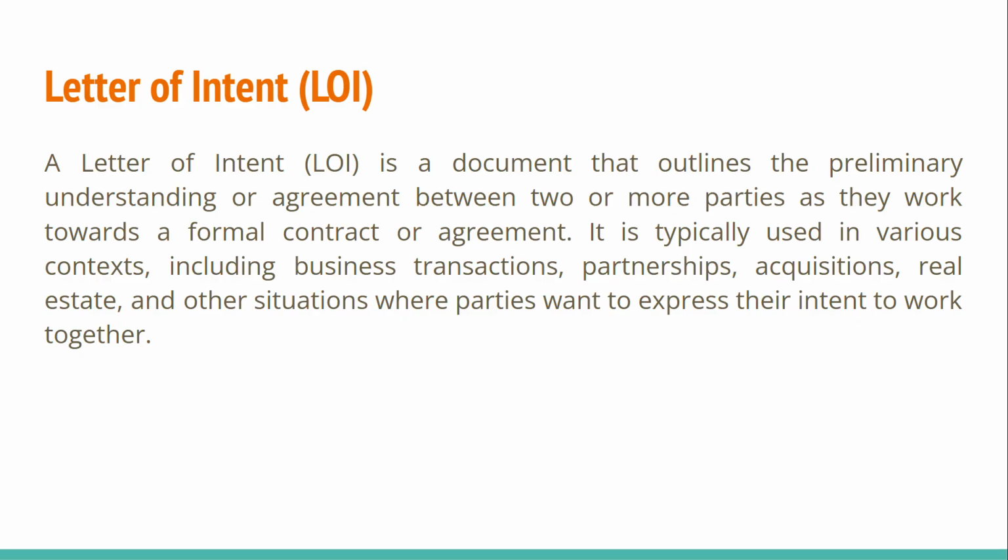It is typically used in various contexts, including business transactions, partnerships, acquisitions, real estate, and other situations where parties want to express their intent to work together. A letter of intent is a primary document issued to a vendor, which indicates that the company intends to place an order once final terms are confirmed. It helps the vendor start initial preparation or tooling.